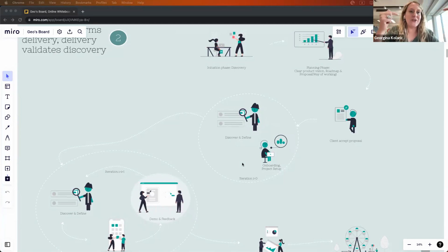In this first iteration, on iteration 0, I need the business analyst and product owner to create the first features, first user stories, to discover them, to make sure that we are going to work on the right piece of functionality. So the product owner and business analyst are focused in the first iteration on discovering what we should do in the next iteration. Also, the business analyst will define this with the development team.